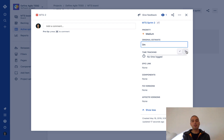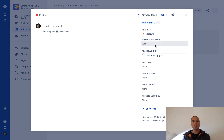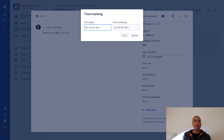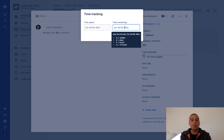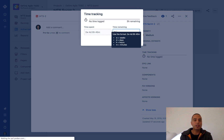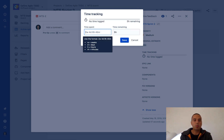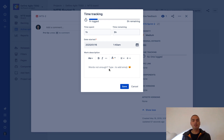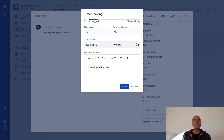There's an original estimate field — if you don't want to use story points you can use it in minutes or hours or whatever you want — and also there's a time tracking field here, which is pretty neat. If you click on it, it allows you to see how you spent your time and how much time is remaining. So let's say when I picked up the story I think it will take me five hours, and let's say I already spent one hour on it. Every time I log my actual time I can put a description, like 'investigated the issue,' and then I click save.